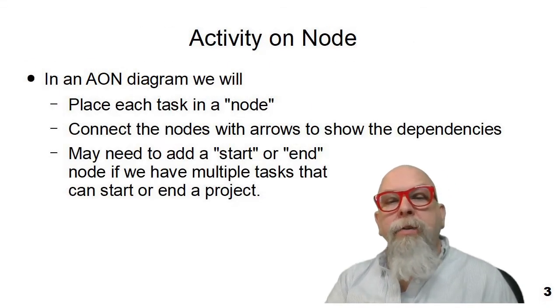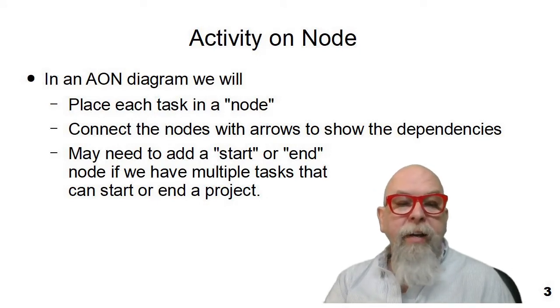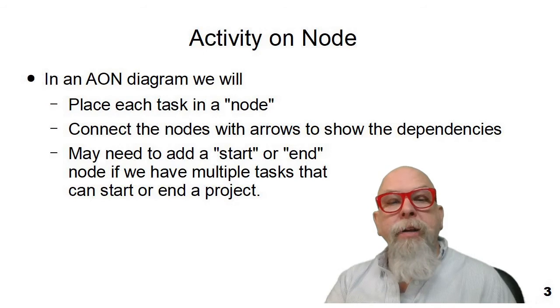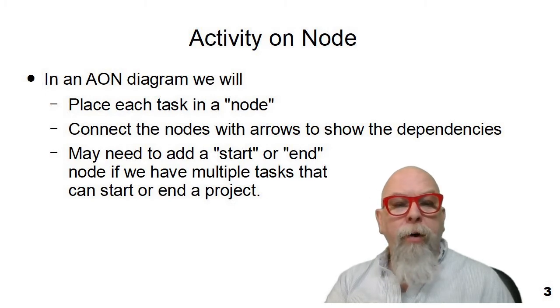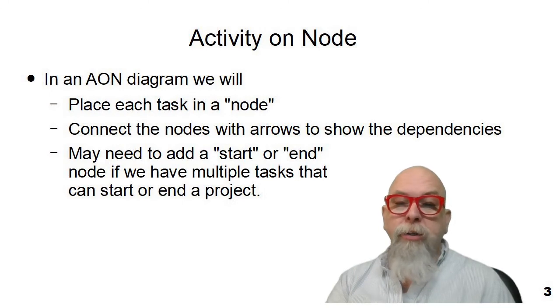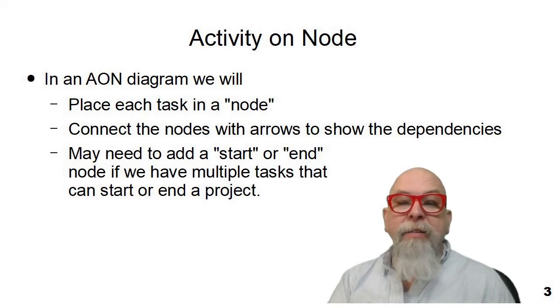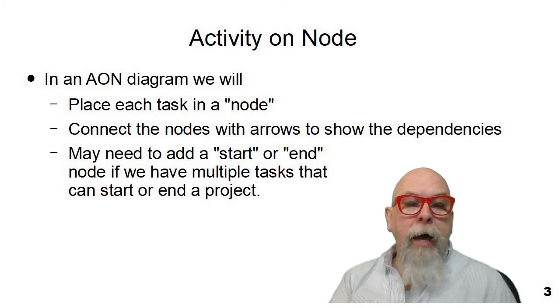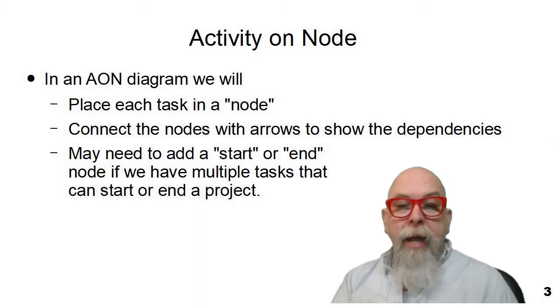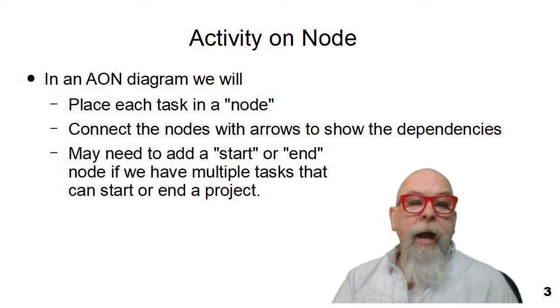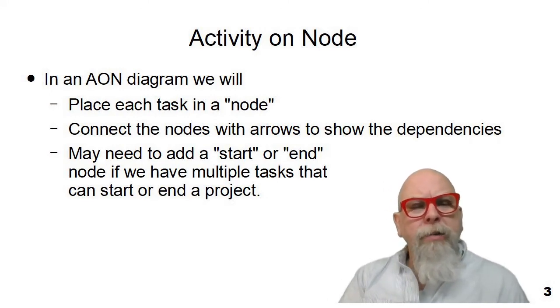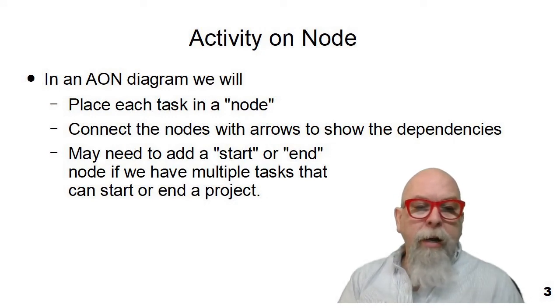In an Activity on Node diagram, we will place each task of the activity in the node or in the circle or whatever shape we use for the node, and we will connect the nodes with arrows to show their dependency. This works really well for start or finish to start relationships. We also may need to add a start or end node if we have multiple tasks that can start or end a project, but it's optional and may be left out if we have a network that we're diagramming that does not have multiple tasks at the start or multiple tasks that can finish.